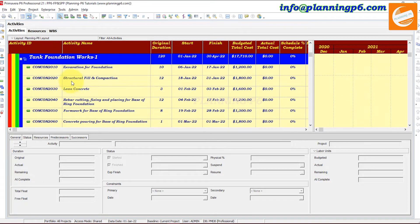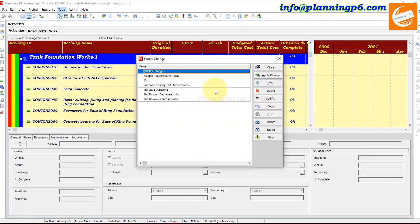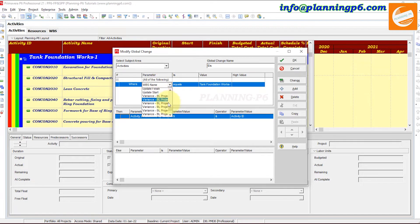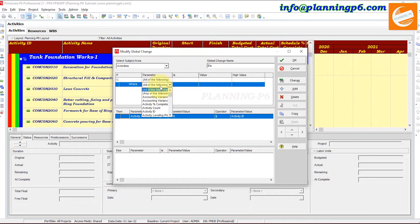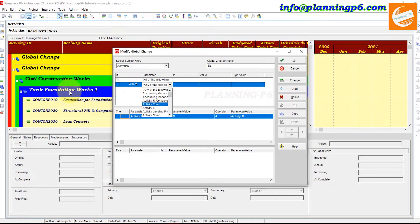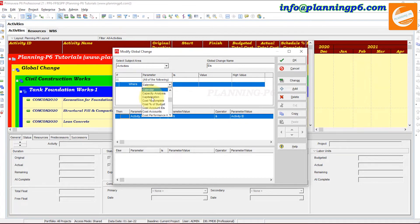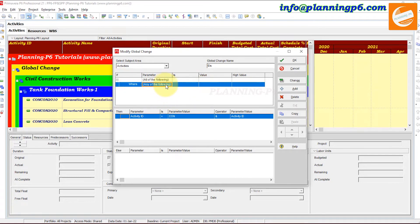If you want to change activity IDs for the entire project, do not apply a WBS filter. Just set the Activity ID condition under Global Change. For example, you can set Activity ID to change globally across the entire project. Whatever cost or field value you want to modify, give the value here. If changing WBS fields, configure the WBS option accordingly.